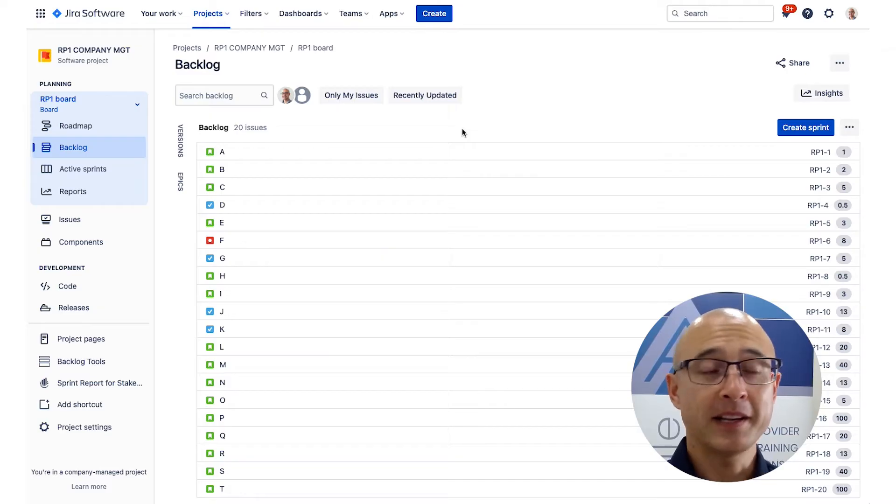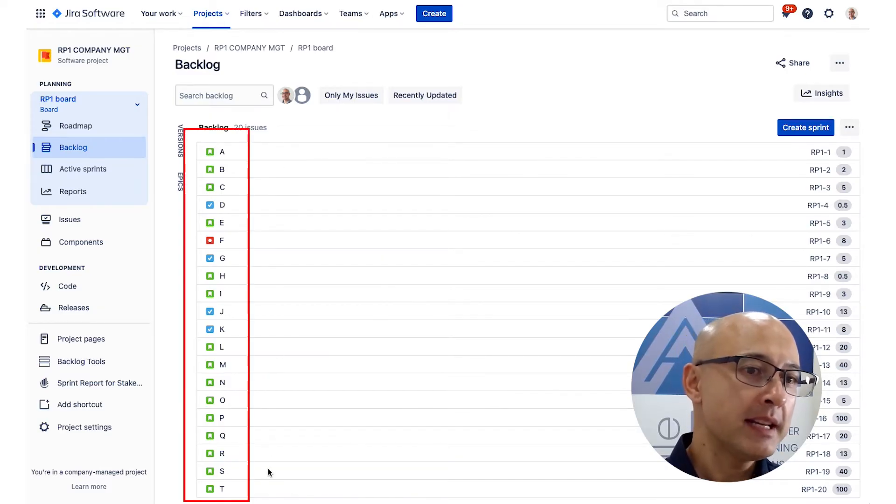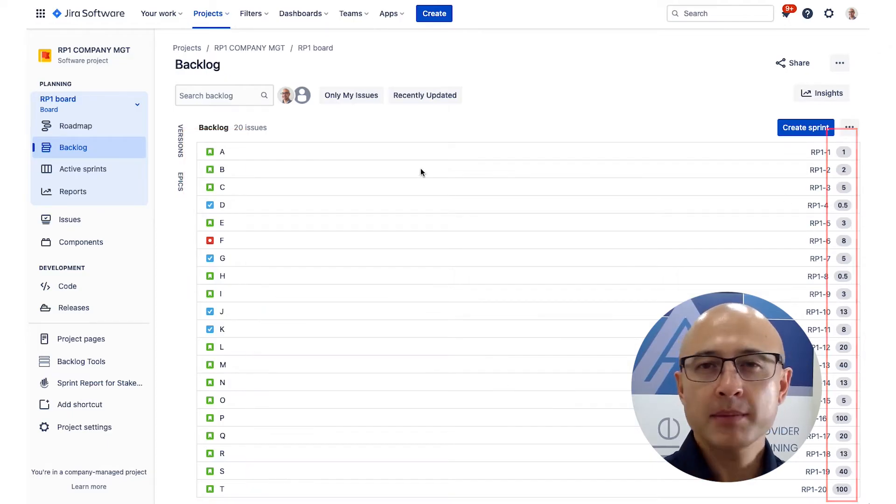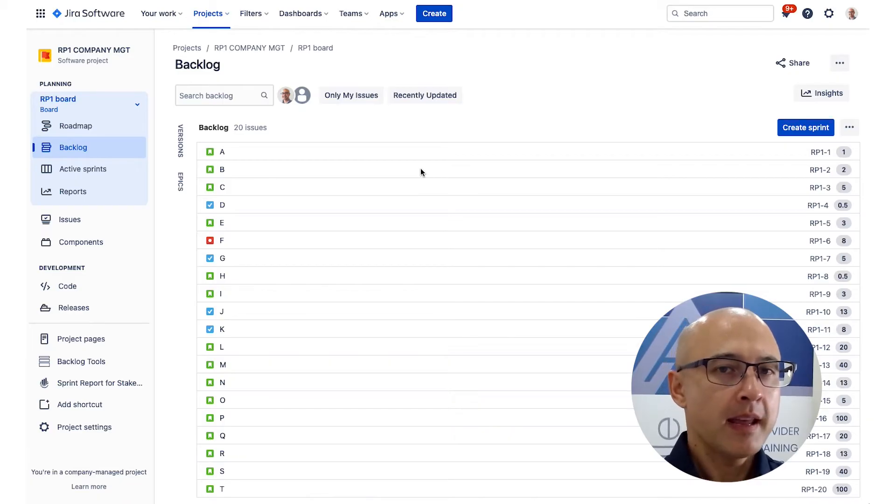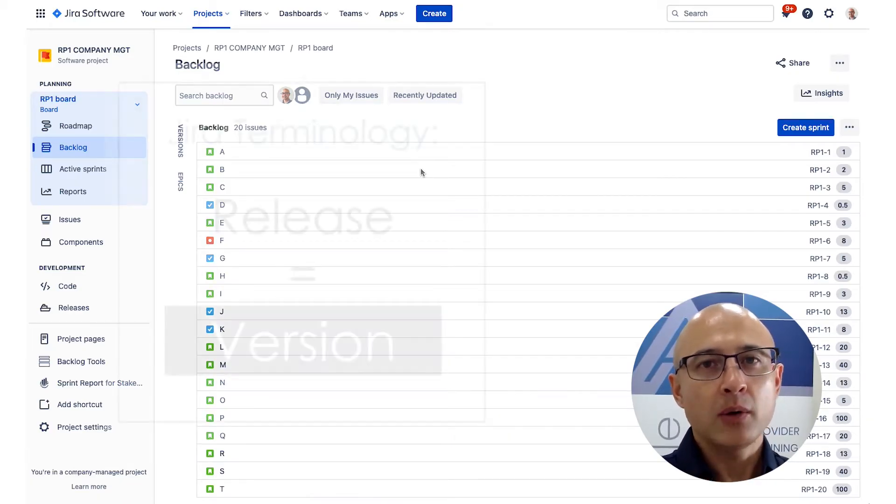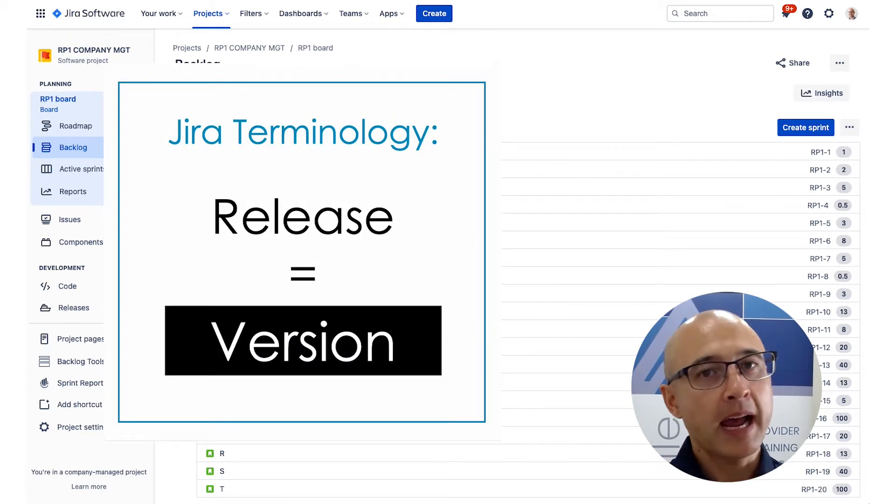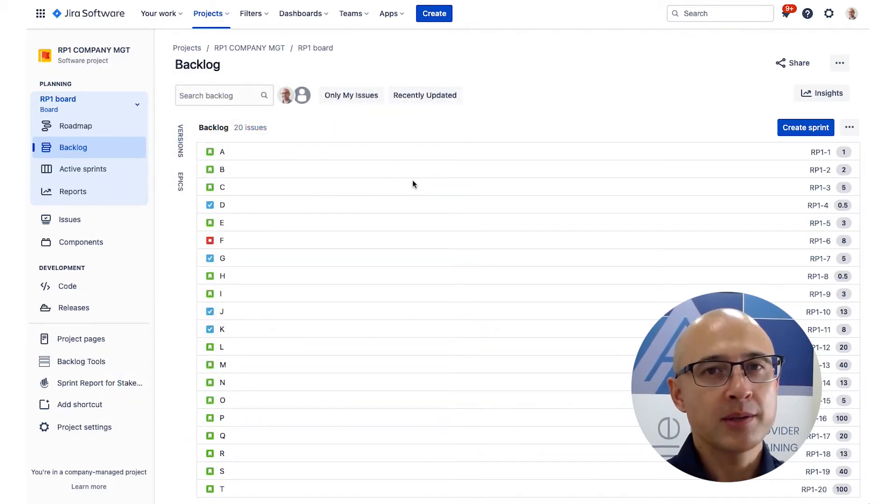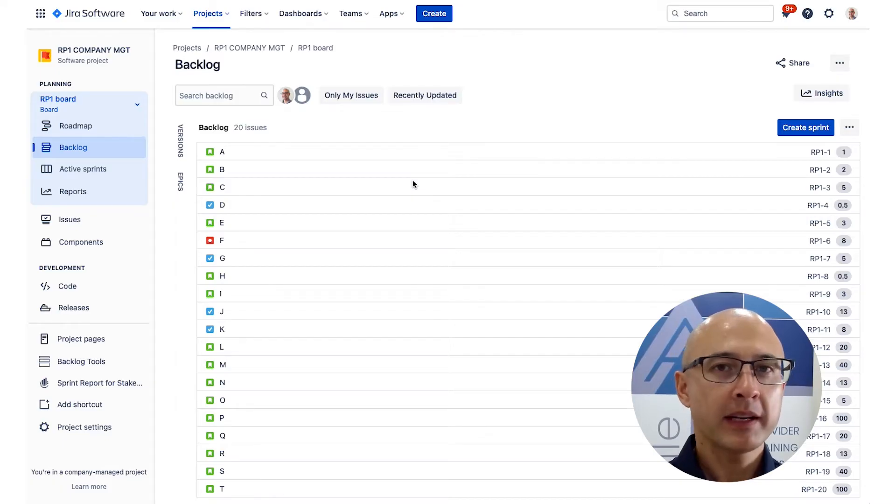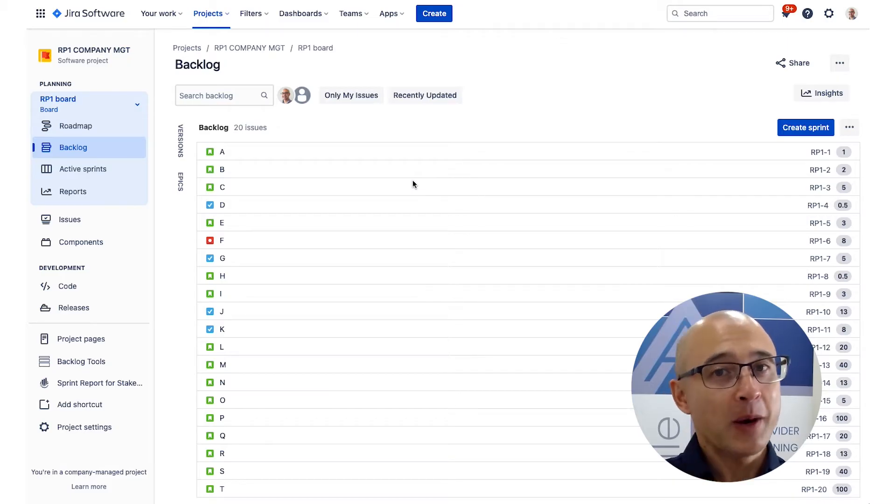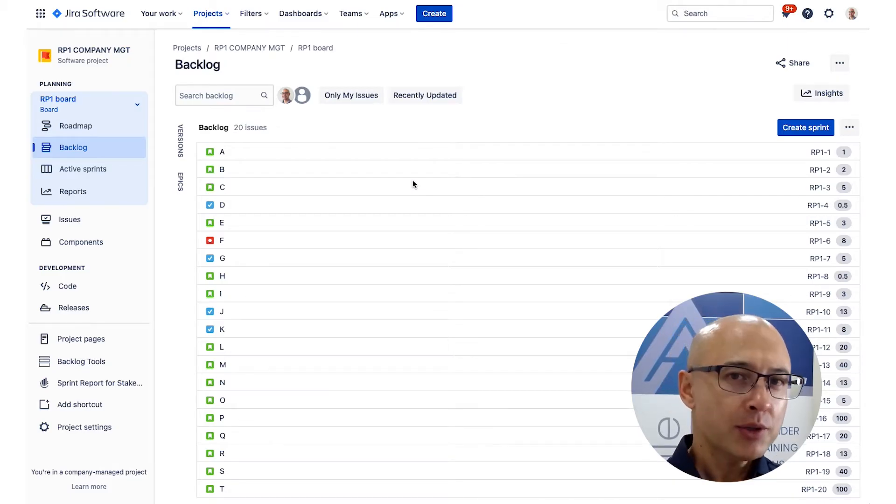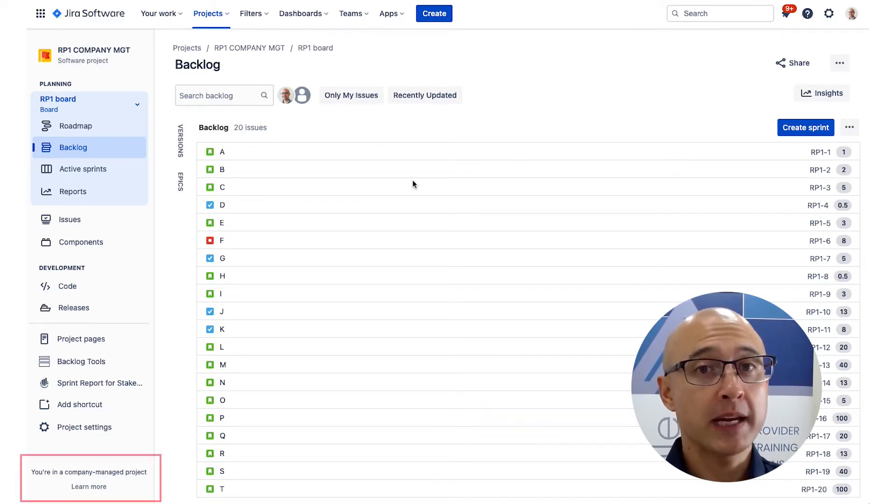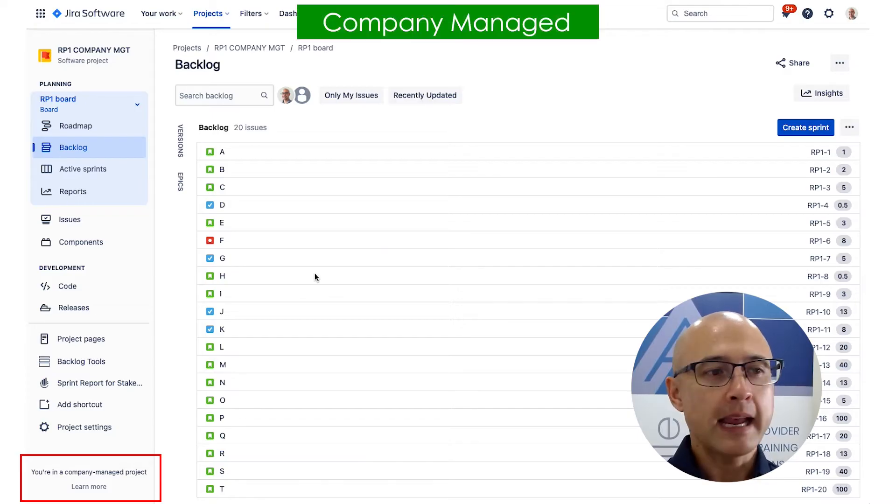Okay, so here it is. My product backlog A through to T is there, and you'll also know I have all the story points assigned. So just before we get into it, a few things I have to mention. In JIRA, what's called a release is also called a version. So whenever you see version or release, they're actually the same thing. I know it can get a little confusing. And there's a few different ways you can create a version. Depending on whether you're using a company managed project or a team managed project, the way you create a release might be slightly different. So if you're not sure what sort of project you're in, just check out the bottom left corner of the screen and you'll see it there. So let's look at a company managed project first.